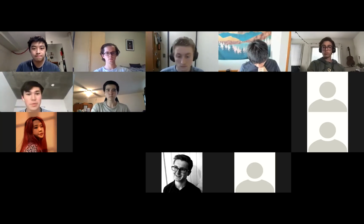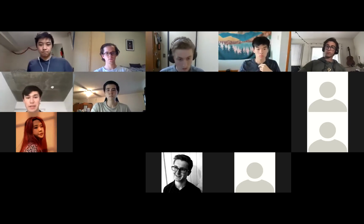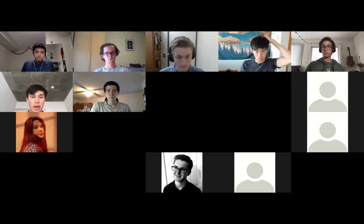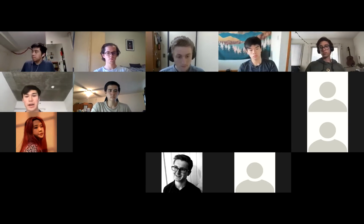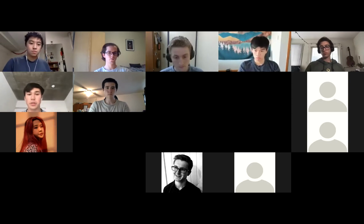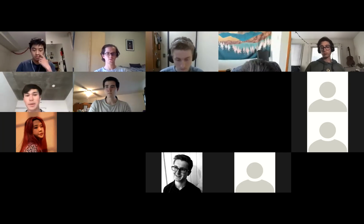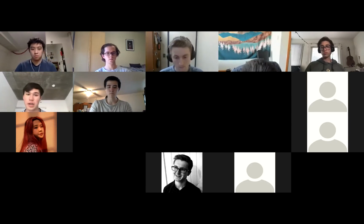Something I would note is that it definitely gets hard when you have variable deadlines. So one way of going about it is, if you're unsure how long it'll take, or if it will take a long time, try to break it down into even smaller chunks for them to do, and that helps make things a little more concrete. Because if it's just one very small specific thing, it's a lot easier to gauge how long it would take.